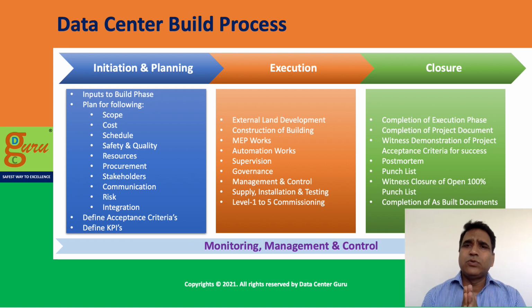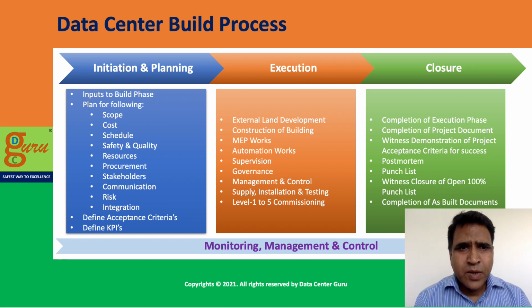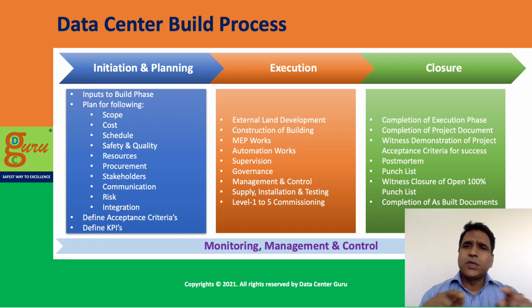Now coming back to the closure phase. Before I talk about the closure phase, normally if you see the overall time graph, how much time the entire initiation to closure takes, if you say it is 100%, then 10% is normally taken during the initiation and planning phase, and another 10% by the closure phase.